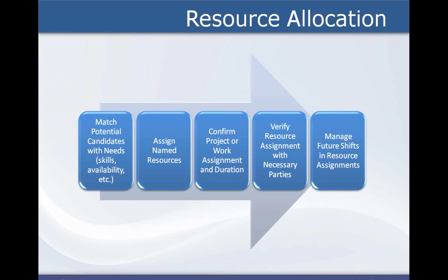In addition to the environmental factors, a roles and responsibilities document should be completed prior to assigning resources. An org chart will also aid in this process when determining the resource assignments, as well as the preliminary project schedule to view when each resource is needed and for how long. In many cases, the project team members are known in advance.